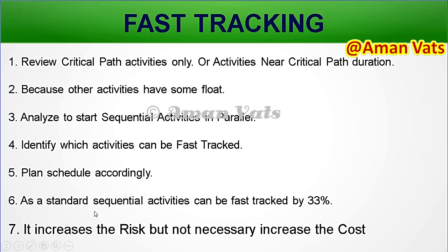As a standard, sequential activities can be fast tracked by 33%. So you will be able to save 33% of your time, but it has risk. It may not increase the cost, but it has increased risk. So risk mitigation and risk control definitely have to be very strong.